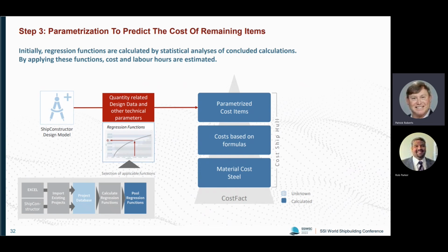And of course, the more information is available from the design system, the better this approach can be used. That is the reason why for changes, where we usually have a very high degree of design model data available, this can work well, nearly automatically. So the design change comes in, we have the update on the technical side, update the cost model, and we can deliver our quote for this change request.